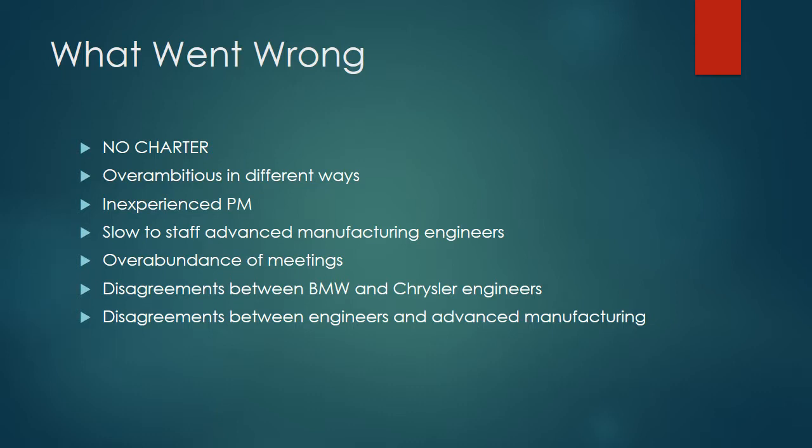There were disagreements between BMW and Chrysler engineers. They had different philosophies. BMW engineers were used to being the kings and the manufacturers didn't question their designs, they just did it. Whereas at Chrysler, manufacturing engineers would frequently push back on the product designers. And of course the overarching disagreement between the engineers and advanced manufacturing and the stalemate that ensued.